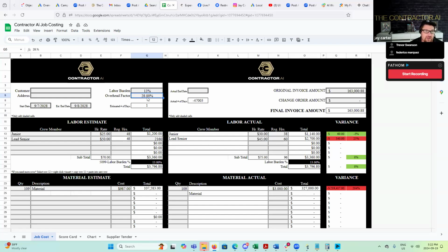So that means that in order for you to be responsible, you're going to do your overhead recovery on a monthly basis and make sure that any losses from the month prior, or, again, even if you've made gains, maybe you adjust your overhead so you can be a little more competitive. Does that make sense? Anybody unsure of what I've just explained there?